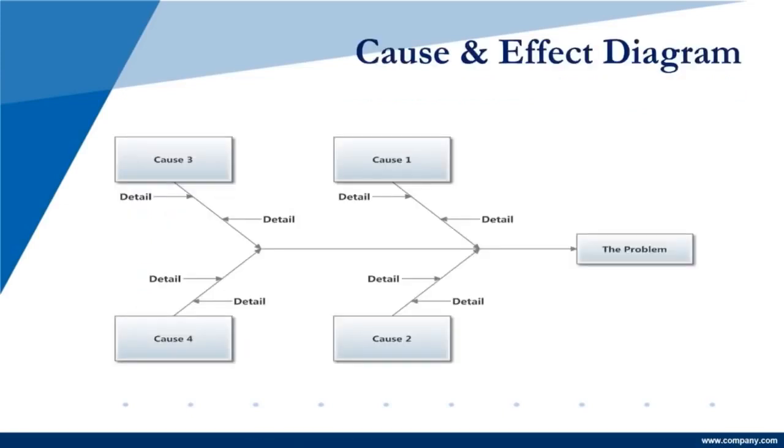Here's the cause and effect diagram. Note in this diagram, it's called an Ishikawa diagram because it was somebody who had created it first. But we look at it here. We would also maybe look at it in our risk analysis, risk management portions. But we have a problem. And here's how the cause and effect work. Your problem leads you to look at maybe this is the cause, or this is the cause, or this is the cause, etc. And then you detail out that cause and effect.